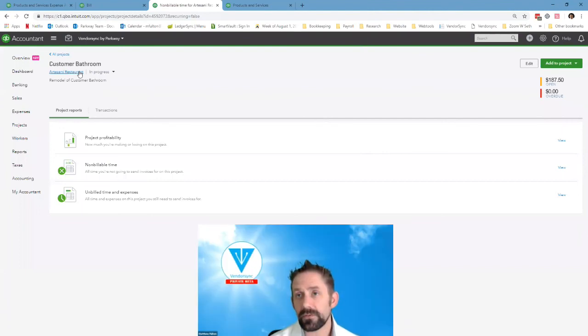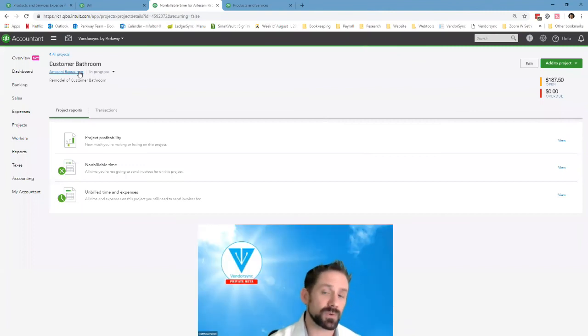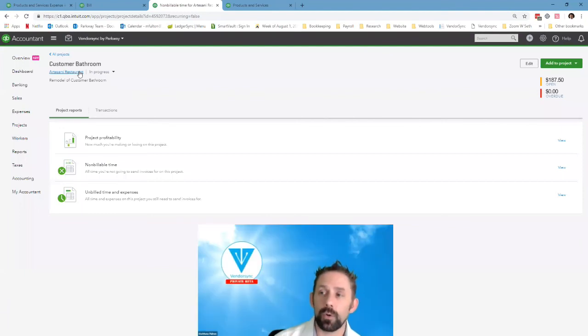And the super fast, simple version of that is if you have your profit and loss structured appropriately, you can take all of your other overhead expenses for a given period of time that you know is a good representation of how your business normally runs, and divide it by the total number of hours everybody worked. So it's a blended rate that way. And that will end up giving you an average per hour to attribute to jobs. It is not the most accurate, but it's one of the simplest ways to contribute your overhead into the process.